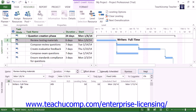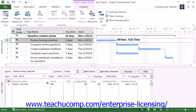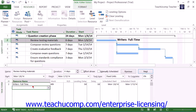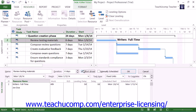For example, if you wanted to add a second work resource to a selected task, first select the task within the Gantt chart view. Any resource assignments will then be shown in the task form view at the bottom of the split window. You can add a resource by clicking into the next available blank row in the Resource Name column within the task form view, and then using the drop-down arrow to select the name of the second work resource to assign. Note that the Effort Driven checkbox within this pane should be checked and that Fixed Units should be selected from the Task Type drop-down.